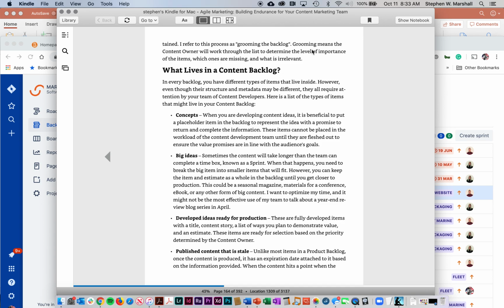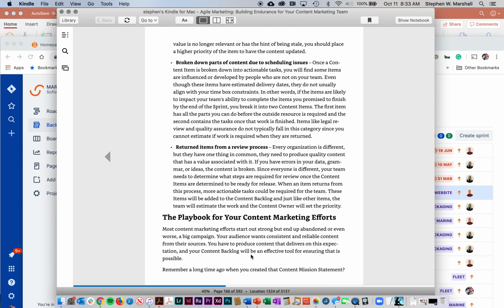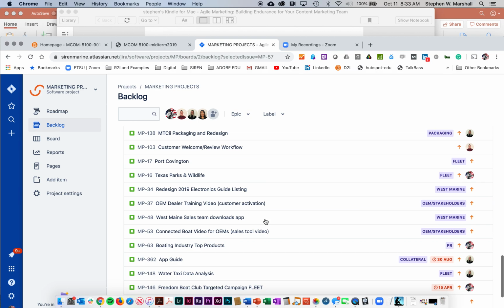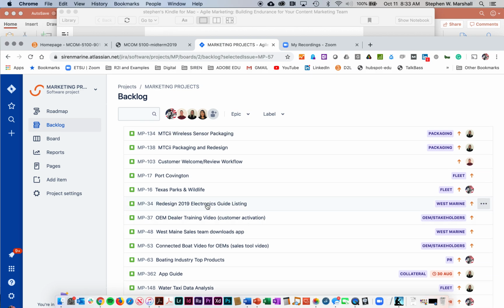So, a couple of things. This is like the content backlog. Again, I wanted to show you what it is. It's the concepts, it's big ideas, it's developed ideas that are ready for production, it's published content that's stale. We have all these different things that we could have in the backlog, and at any time, if we look at our sprint and our week, and we know how much time we actually have to do stuff, and the projects that we have are not summing up to the total amount of story points or the total amount of time that we have, then we can drag projects that may be a few weeks or a few months down the road into the sprint so that we're able to knock some things out while we have the time to do that.